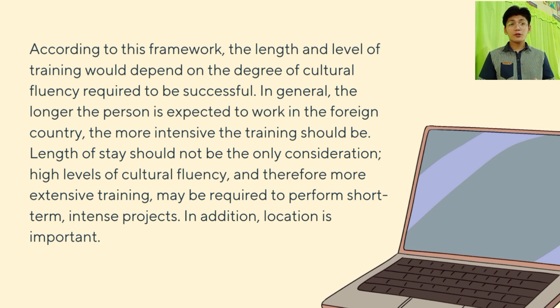According to this framework, the length and level of training would depend on the degree of cultural fluency required to be successful. In general, the longer the person is expected to work in the foreign country, the more intensive the training should be. Length of stay should not be the only consideration. High levels of cultural fluency, and therefore more extensive training, may be required to perform short-term intense projects. In addition, location is important.